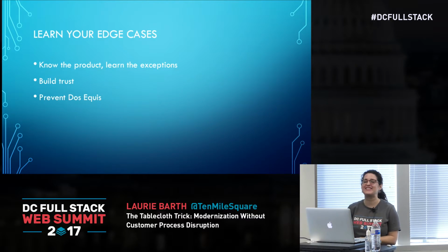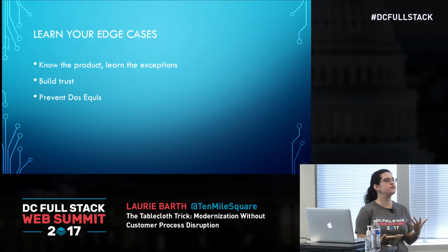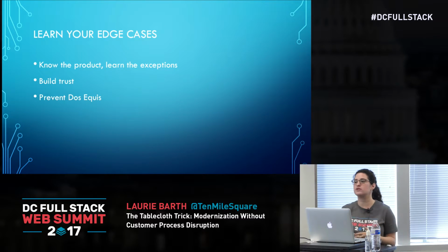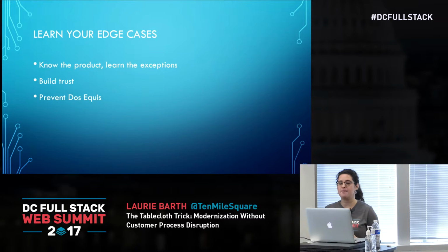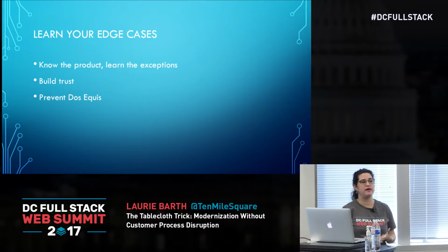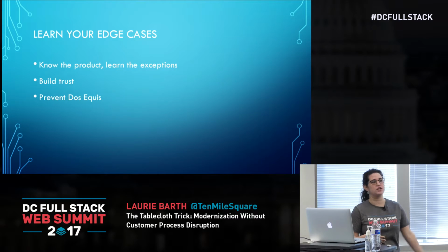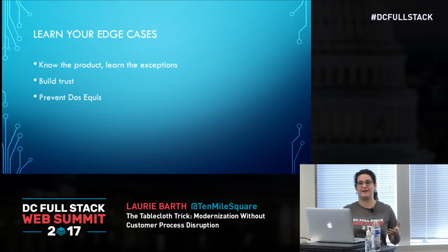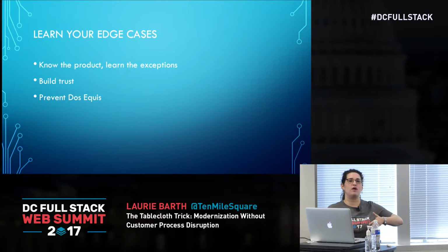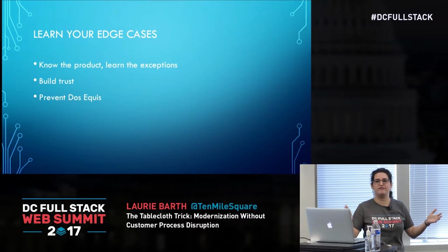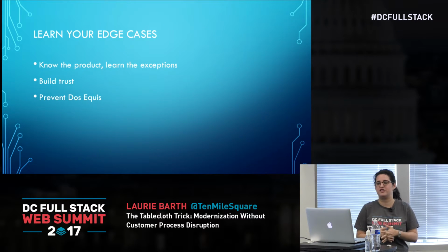The first thing I learned, learn your edge cases. Part of the reason the system was such a mess was that the users were seeing it for the first time, and the developers hadn't reached out to them in the year since they'd gathered those initial requirements. And a lot of things happened in that year. The process changed, whether because law demanded that it did or just because. Developers or people who use the system would leave, and no one was talking about how that changed things.